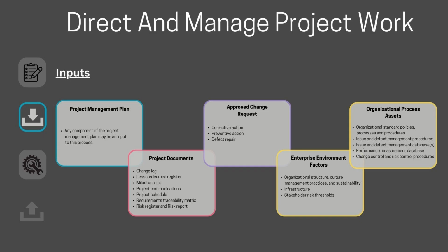If there are changes that need to be made, a change request will be raised, which goes through the integrated change management process in the monitoring and control process group. Once the change request is evaluated and approved, it becomes an input to the direct and manage project work process to ensure necessary corrective actions are taken.